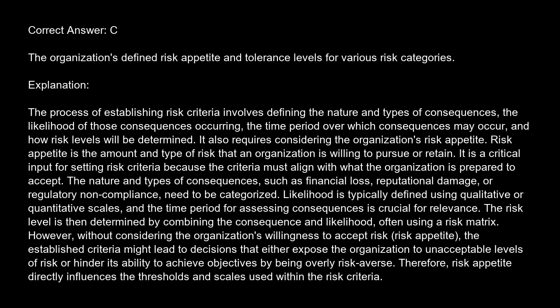It also requires considering the organization's risk appetite. Risk appetite is the amount and type of risk that an organization is willing to pursue or retain. It is a critical input for setting risk criteria because the criteria must align with what the organization is prepared to accept. The nature and types of consequences, such as financial loss, reputational damage, or regulatory noncompliance, need to be categorized. Likelihood is typically defined using qualitative or quantitative scales, and the time period for assessing consequences is crucial for relevance.